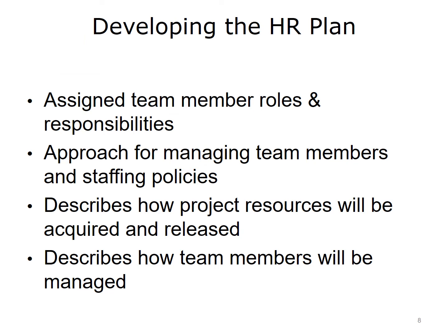After the project team has identified all activities that must be performed, they determine resource requirements, which are used to develop a human resource plan. Resources on an IT project could include a business analyst, systems engineer, system architect, database administrator, and any of a number of other roles. The human resource plan development process involves identifying and documenting project roles and responsibilities.